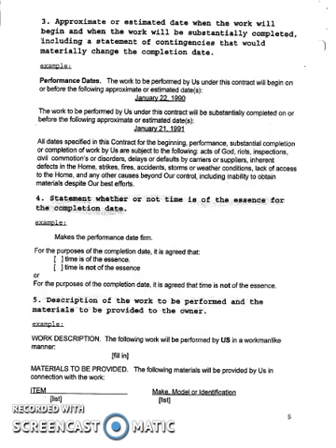The third part is the time frame of the work. So when the work is expected to start and when it's expected to be complete. And that lends right into number 4, which is the time of the essence that you'll read about in the one article I've provided in this module.